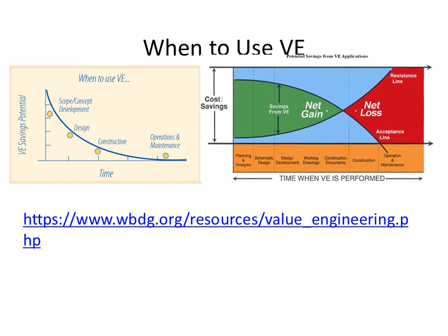You can see the importance here on this slide, where the VE savings can be very high at the initial scope development stage, but it's very difficult to make savings as you go through the life cycle. And you can see the more complicated chart on the right hand side shows savings from VE as opposed to problems if you try and change things afterwards.